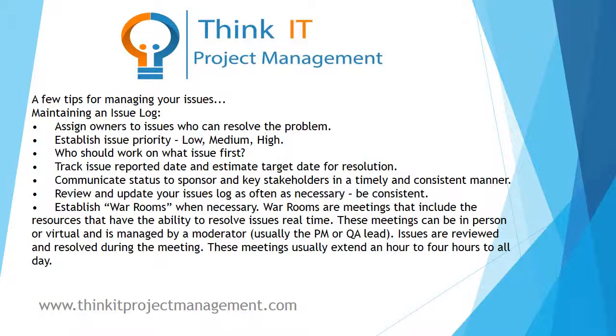Maintaining an issue log is obviously the first step. And as part of that issue log, you should always assign an owner to issues who can resolve the problem. You don't just want to put a name for the sake of putting a name alongside an issue and expecting someone to be able to follow up on that issue. You want to make sure that you are assigning that issue to someone who can resolve the problem.